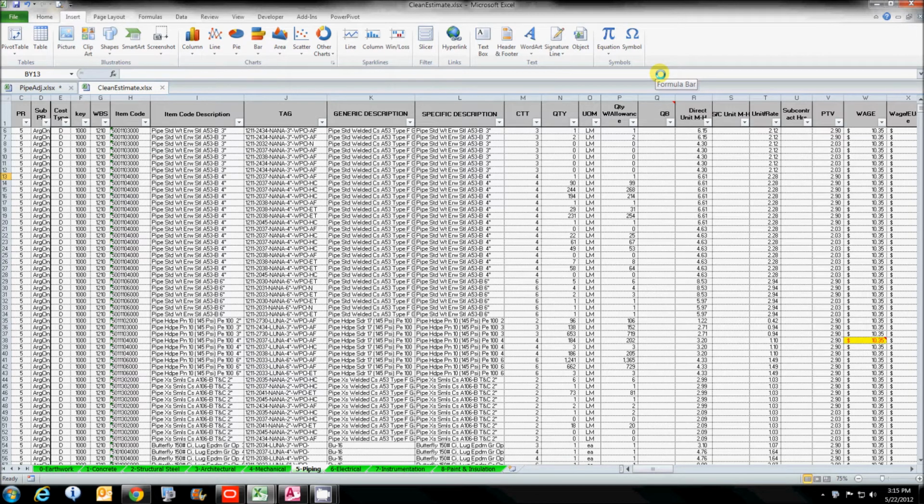This is the Class 5 estimate. I cleaned it up a little bit here. This is the Excel data dump that you'll get from most estimating programs. I wished I could say there's a standard, but there is not. Whereas most scheduling is done, at least in oil and gas, in P6. You get different data dumps from different estimating programs, and in fact, many of the larger companies have proprietary estimating programs. So this is simplified just to these tabs here.